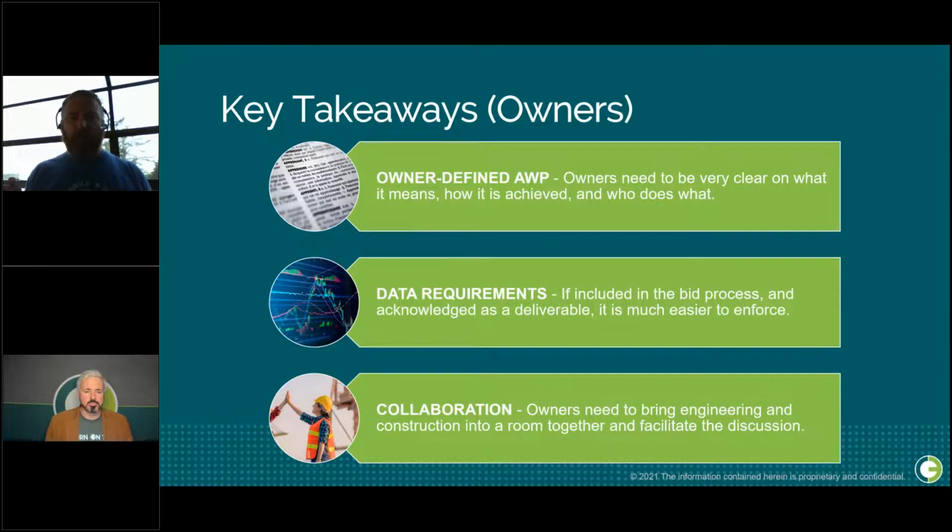So typically, if you get a standard contracting environment where the owner has a relationship with the engineering contractor and the owner has a contractual relationship with the construction contractor, it can be sometimes hard to get that true collaboration between construction and engineering. Everything has to flow back through that contract holder being the owner. So the owner needs to make sure they are facilitating that collaboration, those discussions, and sometimes refereeing the discussions around the path of construction, for example.